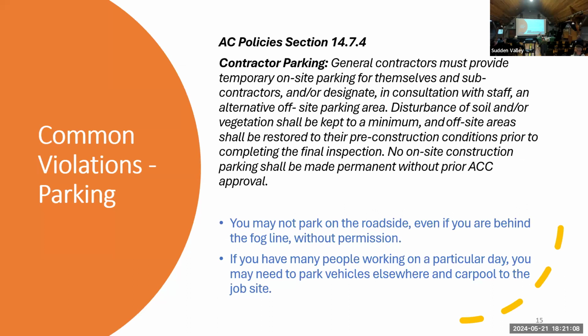I'd like to go over a couple of the other common violations, just so you're forewarned. The first one is for parking. The rules say that you may not park on the roadside. Contractors must park on the job site. That counts even if you're behind the fog line, okay? If you have a lot of people working on a particular day because you have extra subcontractors coming in, or there's something big happening, you need a lot of hands on deck, it may be necessary to park vehicles elsewhere and carpool to the job site.